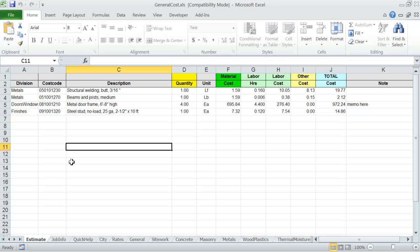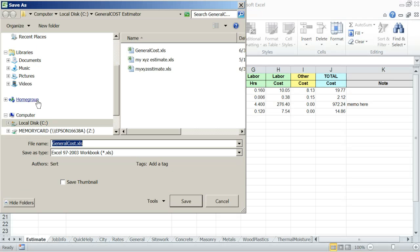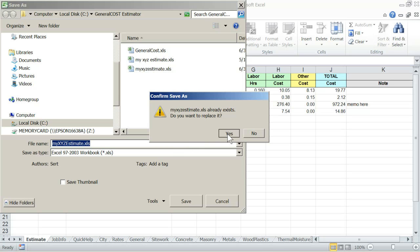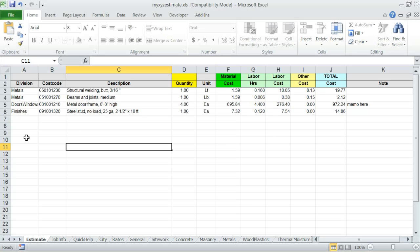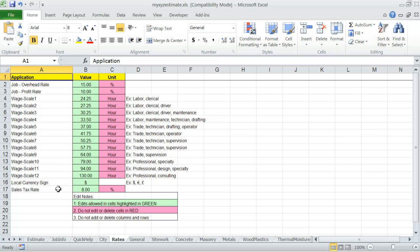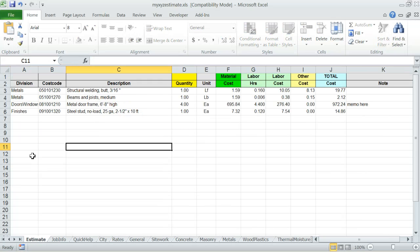Lastly, a few useful tips when you want to start a new estimate. First, open General Cost Excel's original master file, then immediately rename it using Excel's save as function under a different name such as my XYZ estimate. Build your cost estimate on this job-specific file. Before you start building your cost estimate, be sure to review and change, if necessary, the overhead, profit, wage rate, and sales tax information in the rates worksheet. This is all for the moment and happy estimating to all.